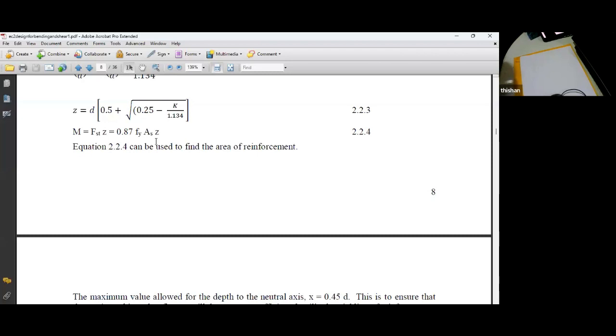recorded, and all the record keeping will be there, and you can use a database for record keeping. You don't have to write everything on paper, but everything can go into a notebook. But every day all the data is entered, and you have to have an up-to-date database. So if anything goes wrong on a particular day, all the information of what happened, including the photographic evidence and video evidence, will be there.